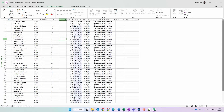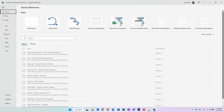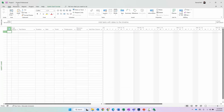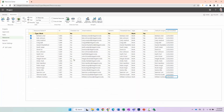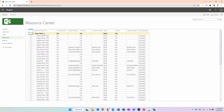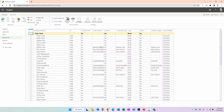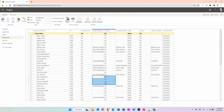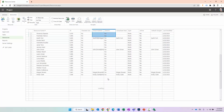I want to save this. It's my checked-out resource pool currently. Once I finish saving, I'm going to close the enterprise resource pool — we'll save it and it's going to check that back in. We'll go back to just the project. I'm going to deselect those two resources and click on Resources again, and you should see many more resources show up. Both the actual resources that have accounts — you can see them there — and all those other resources who don't have accounts that I just added to the system. Now we have a full pool of resources I can start assigning to my projects.